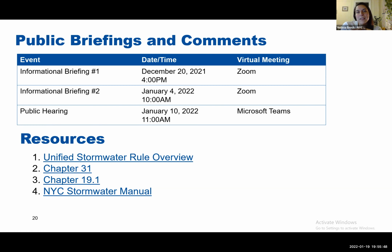Applicants still, because there's a state construction general permit, CGP, there are still notification requirements to DEC. If you're in the MS4 and you trigger the CGP, you're still notifying the state. But our stormwater construction permitting program does that review for DEC now. We've taken that permitting program over. I don't think people have said we're redundant. I do think there are a lot of people still trying to figure out where we deviate. We are required to be at least as stringent as the state. We can be more stringent if it's justified, and I mentioned we have a few areas where we are more stringent because we feel it's justified in our city. But at a minimum, we have to be as stringent as the state.